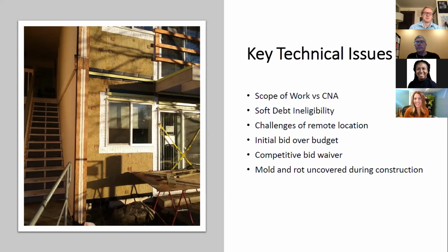Thankfully, Opportunity Council was working with a firm that was doing some work out there on the island for a different project, and we were able to bring them on. But even then, it took a significant amount of work for them to find subs that were interested. And this ultimately led to a pretty significant cost overrun. The project closed in 2019. We weren't able to get a bid from the interested contractor until February or March of 2020. And once we did get those bids in, they were significantly above what we expected.